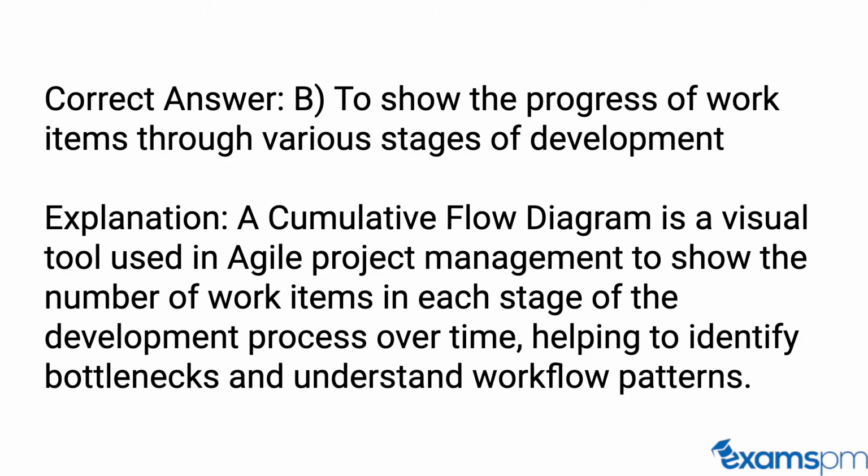Correct answer: B. To show the progress of work items through various stages of development. Explanation: a cumulative flow diagram is a visual tool used in agile project management to show the number of work items in each stage of the development process over time, helping to identify bottlenecks and understand workflow patterns.